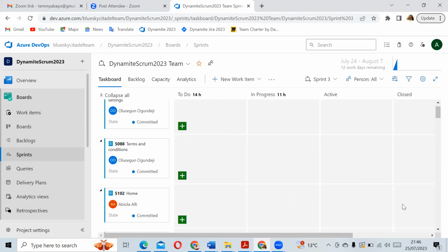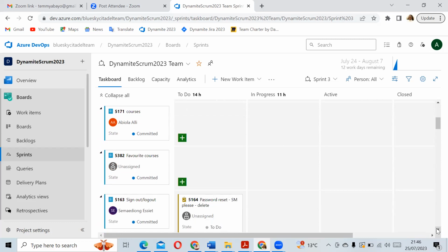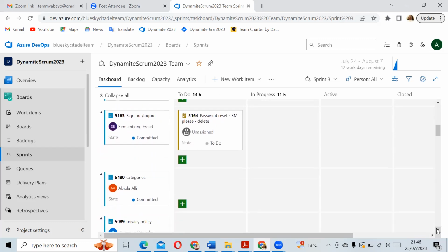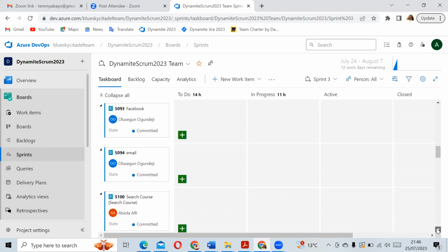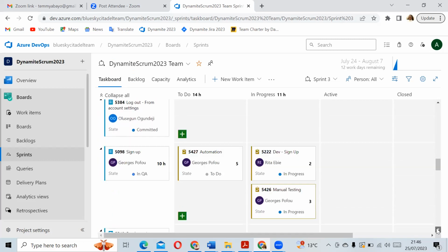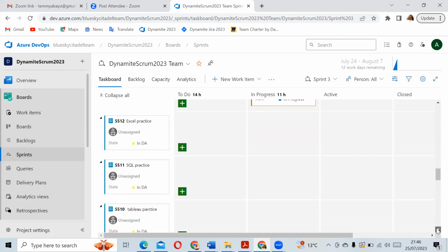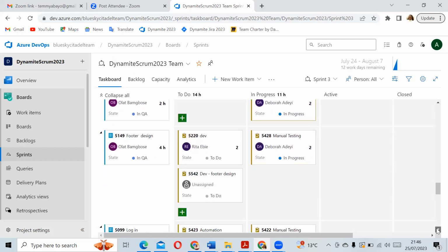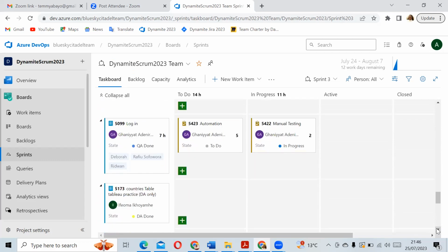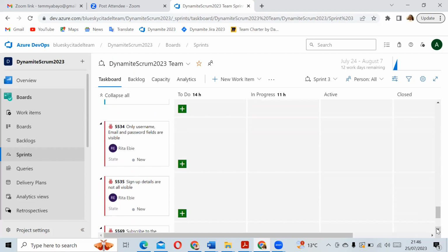Another life cycle you might have for your bug is at a particular time when you look into your backlog, you see that you have loads of bugs there. You want to do a bug triage, especially when it's affecting things you're working on. What you're working on depends on those bugs being resolved before you can go ahead with the story. You want to do a bug triage and decide that the next sprint we're going into, you, the developer, the QAs, and your product owner are able to do a bug triage to say, all these bugs need to go into the sprint.